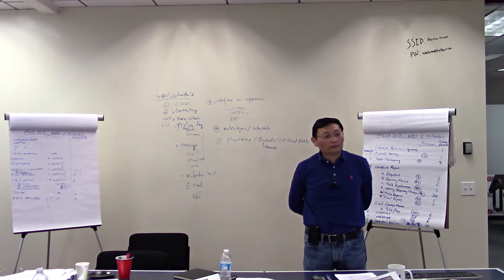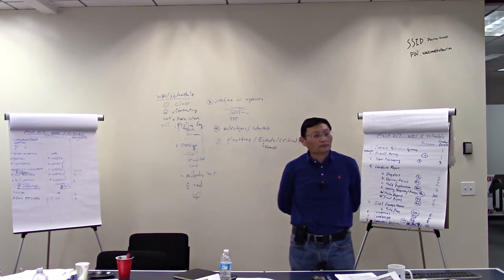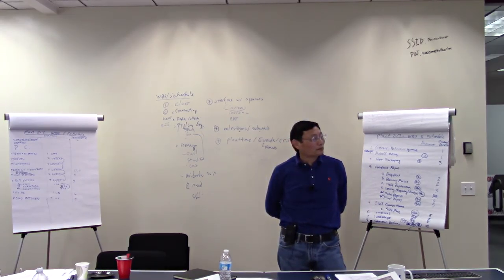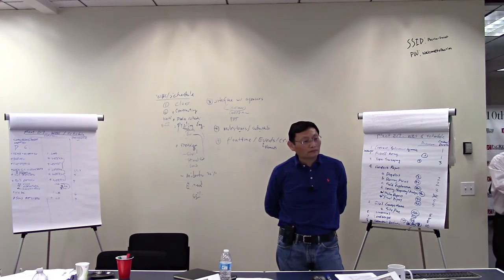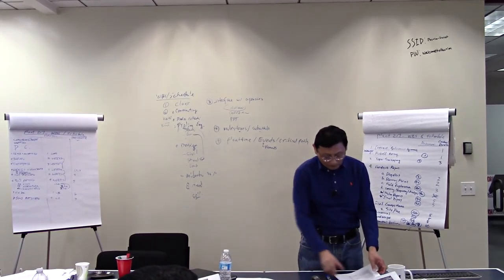Sometimes, in my opinion, the client wants more of a top-down view. The client's not going to care about certain events, like AT was saying. They want to know the geotech report is going to be completed. They don't want to know the dig alert, boring permit, field exploration. But we need to know that. So I like to put that stuff in the schedule, and that's why I label it on the right side. It says geotech report available, so if they want to, they can just look at that. But I find it's impressive to the client that we thought the job through, even if they don't look at everything, and it's a value that they see. I can maybe do something in an hour that they think I spent 2 days on because of the way I can add that stuff in.